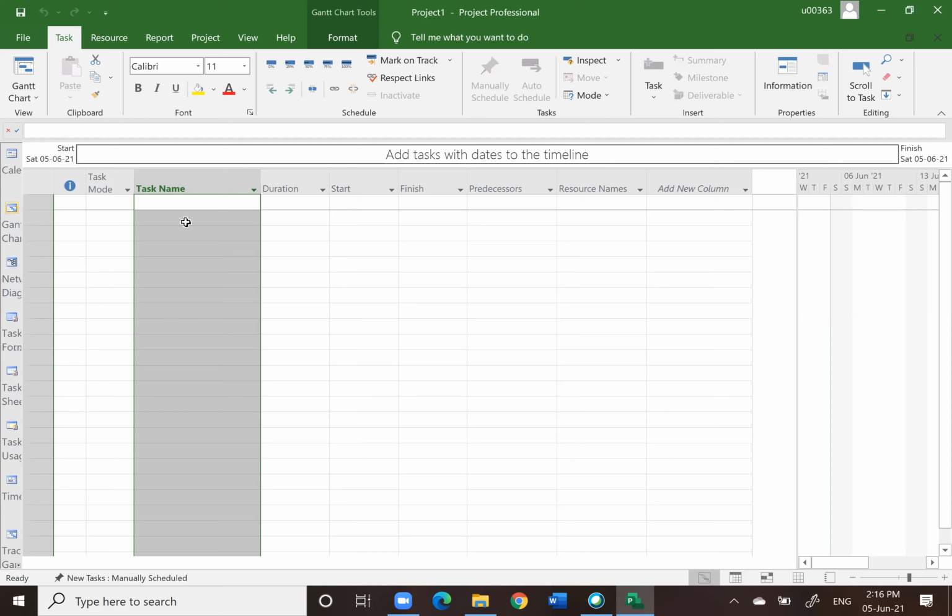For instance, site preparation is a group of work normally done at the beginning of the project. It might consist of a few sub-activities, such as site clearing, cut and fill, grading, formation level, whatever is related to all kinds of earthwork.